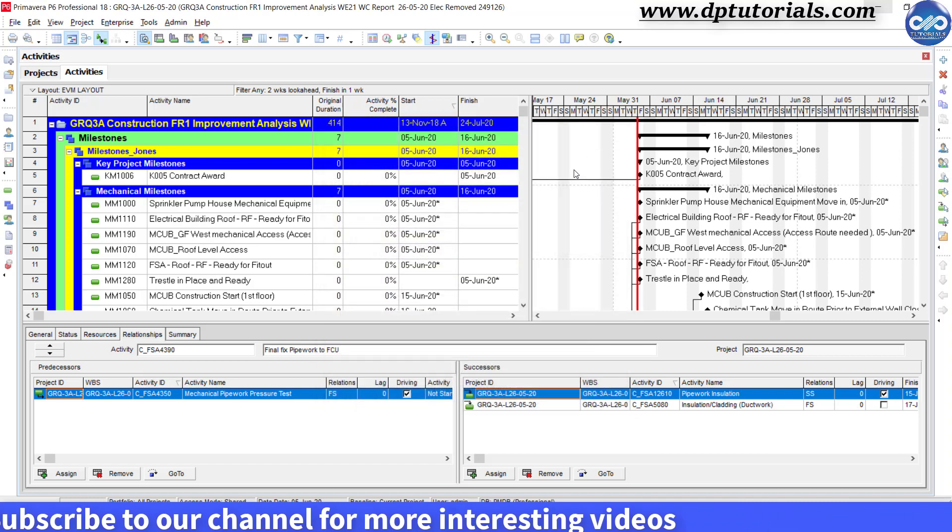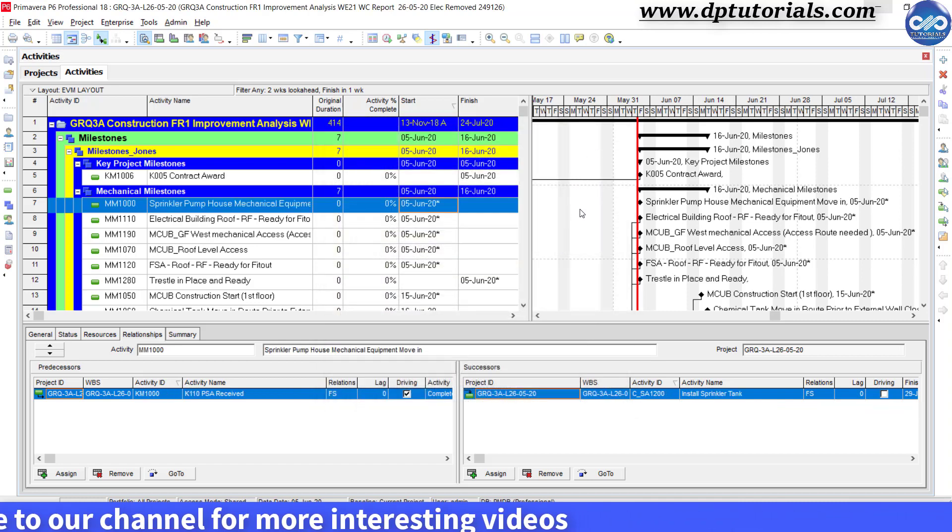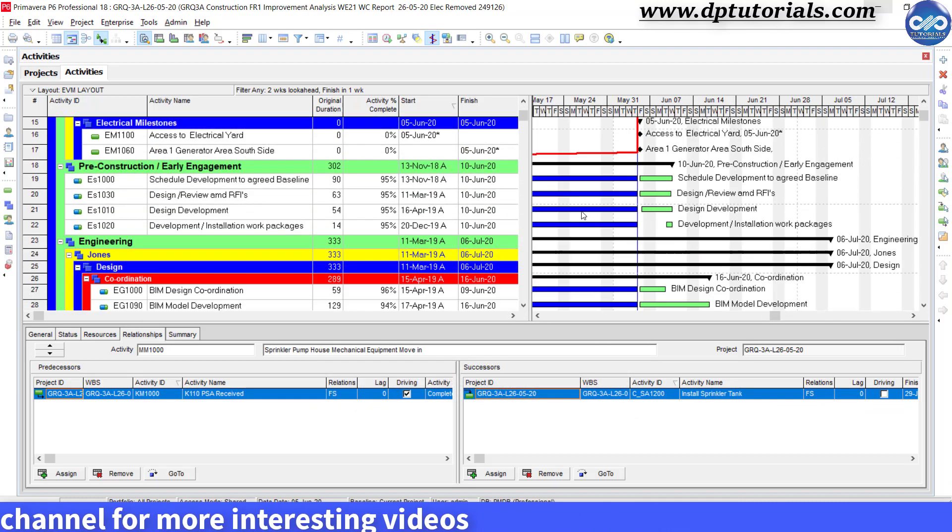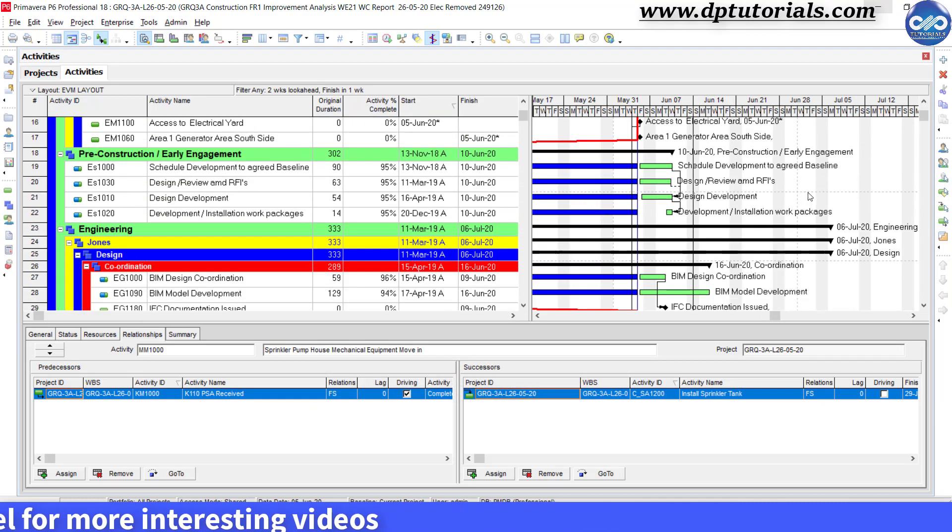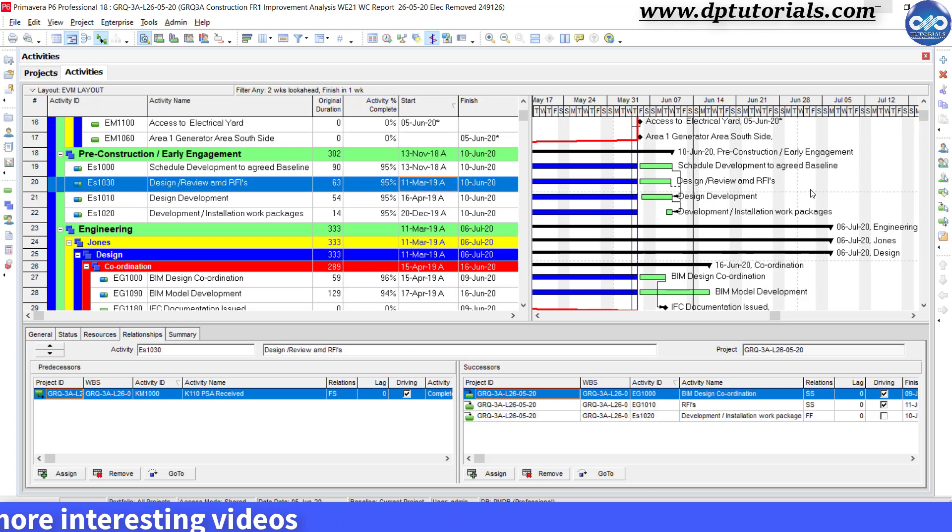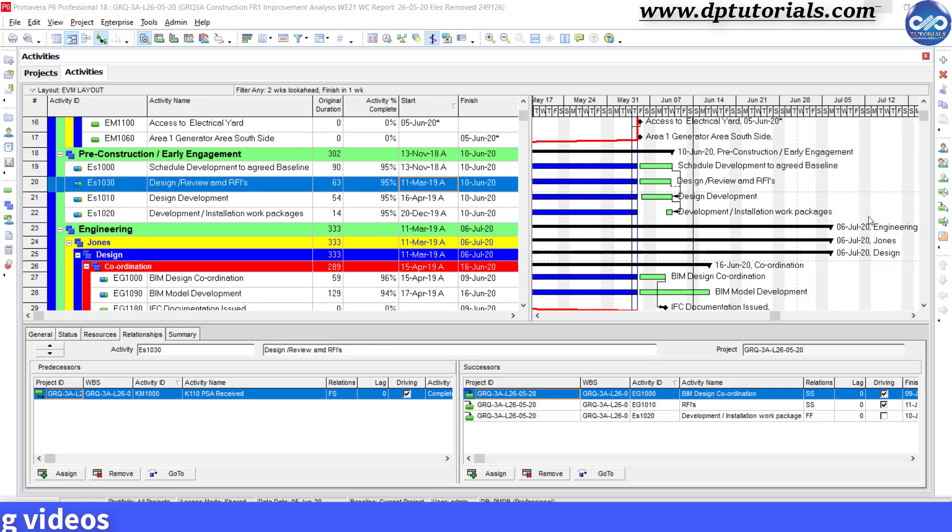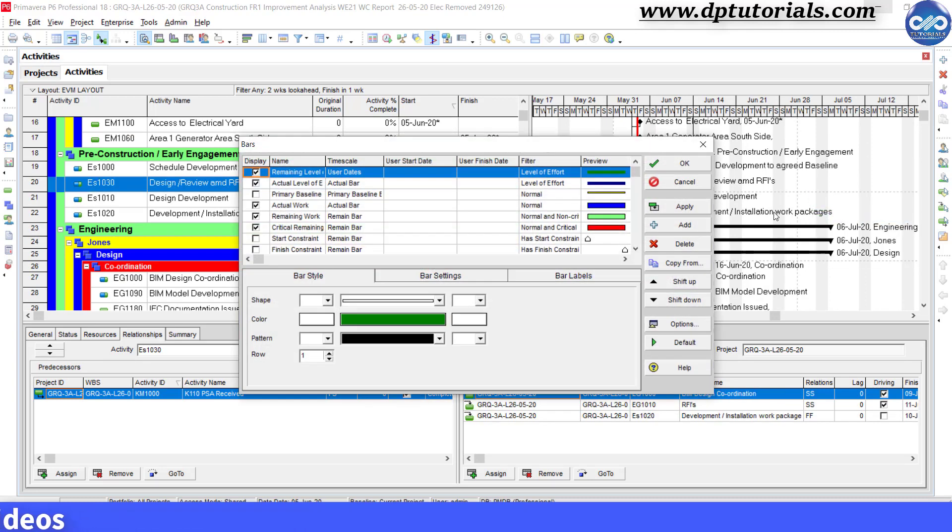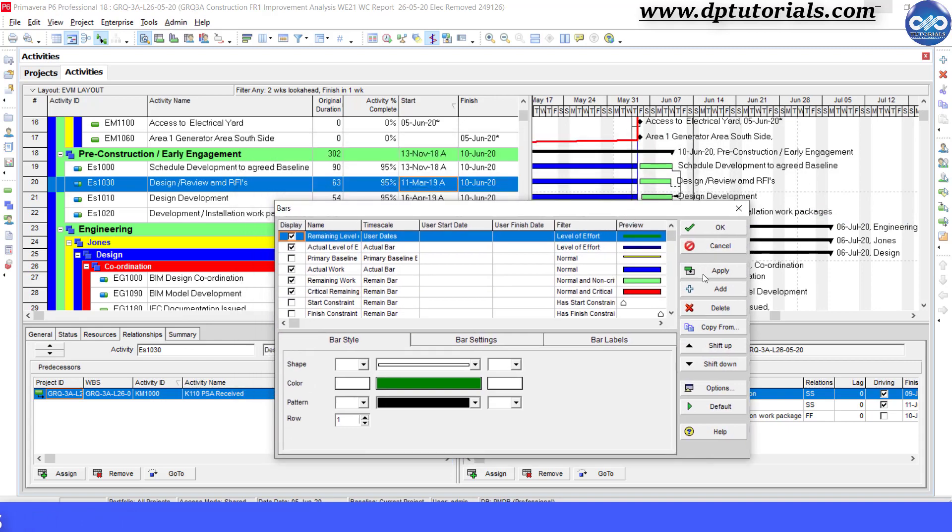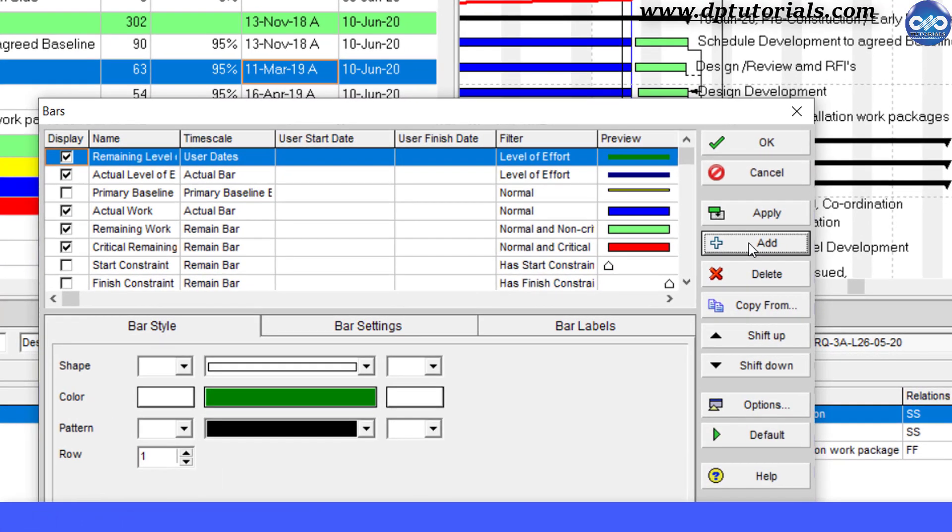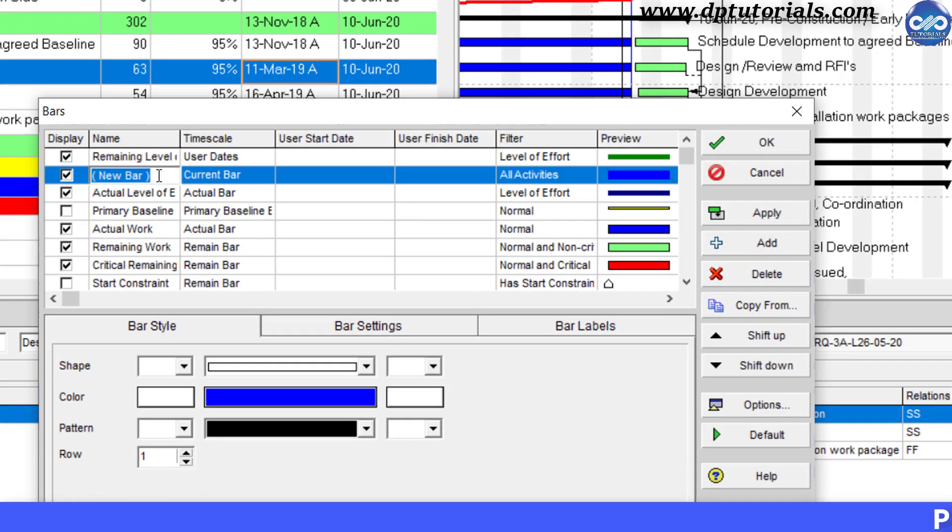Now go to the Gantt chart, right click and select bars. Click on add to add a new bar here. Under name, give it a name as finish in one week.